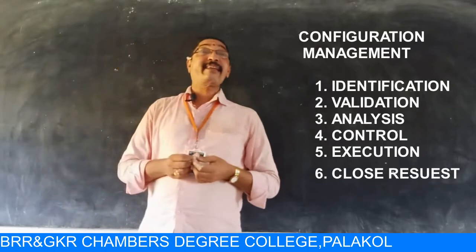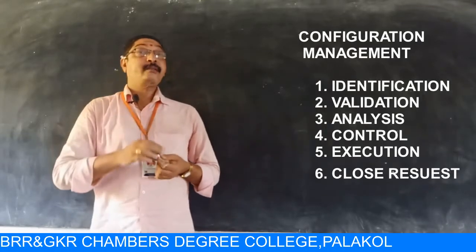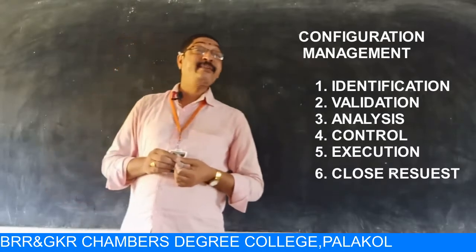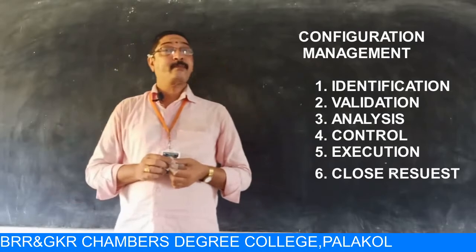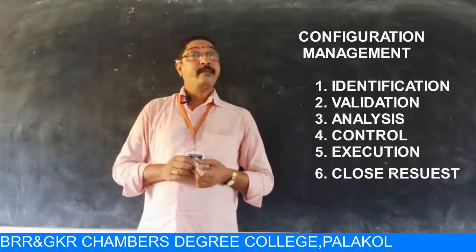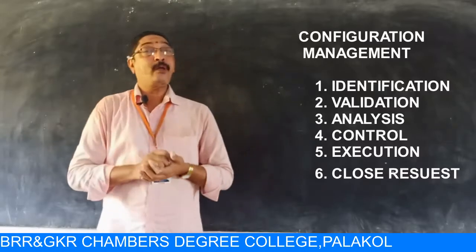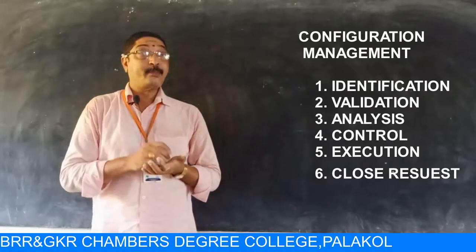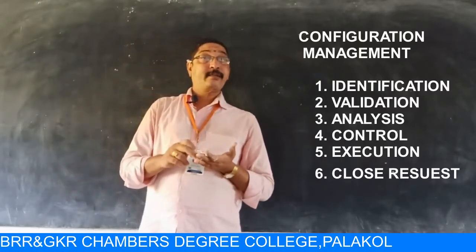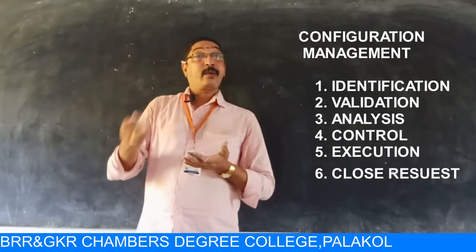And the next stage is control. After analyze, they have to go for control. If the requirement change is mandatory, it is unavoidable, then the information must be passed to top level management about the change request and the impact of this change of requirement on the project.